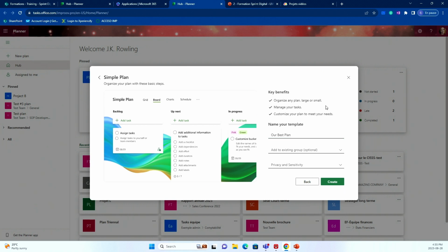Super important to do this, because if you create a plan in Planner and you do not link it to any existing team, now people won't be able to find it easily in their Microsoft Teams. It'll just kind of be standalone. They'll have to go to Planner to see it, to actually have an overview of the entire plan. The plan will not get automatically added to the members of the team. So you're going to create a lot of work for yourself that's really not required. So best practice, make sure you attach it to an existing team.